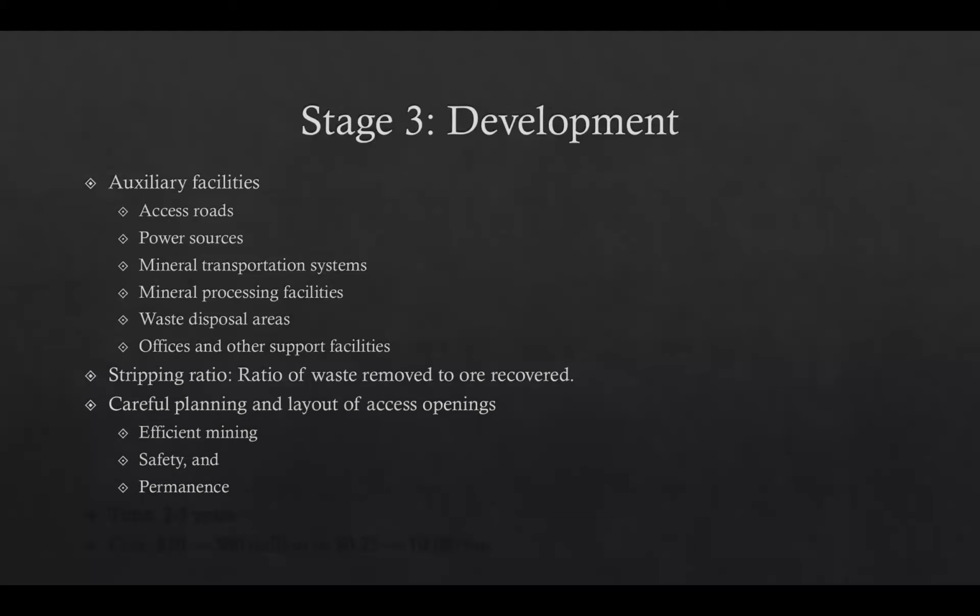Development can continue during the exploitation stage as well, but initially it takes 2 to 5 years normally before the start of mineral extraction, and it costs approximately 10 to 500 million dollars based on the nature of the mining project.